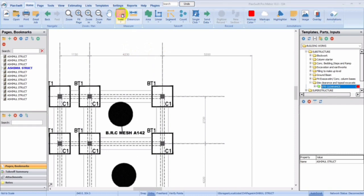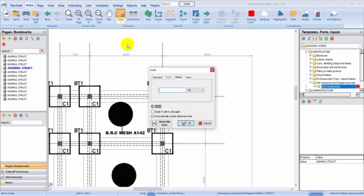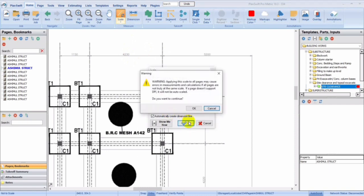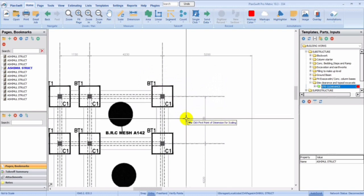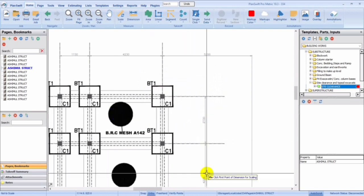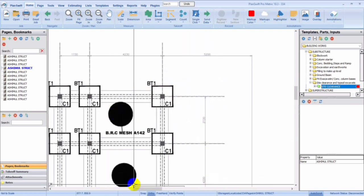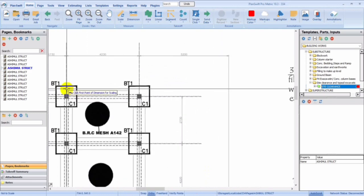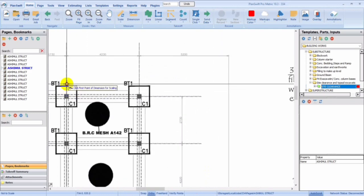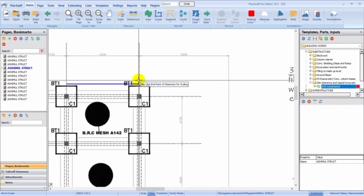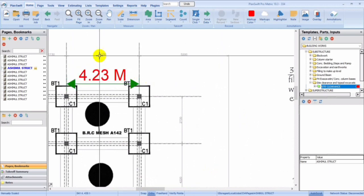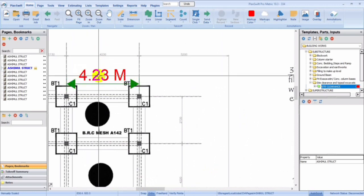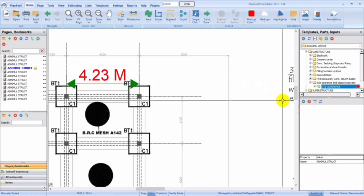So you can just click on scale over here and then let's put in 4.23, which is in meters. You can decide to apply to all pages. You see 4.23. So now we are good to go. Let's begin our site clearance.